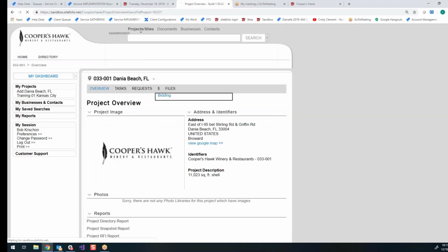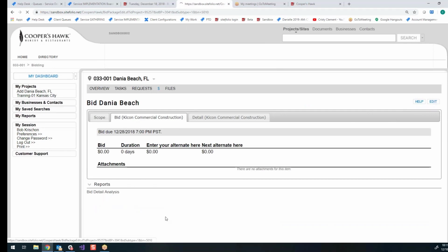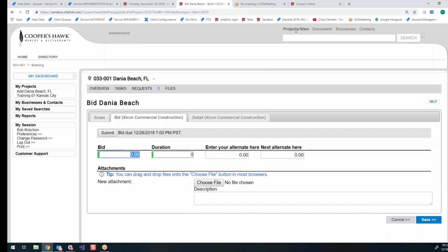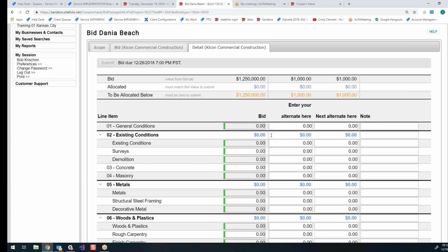So I'm Mr. Kycon, and I'm ready to submit my bid. So the first thing it's going to ask me to do is enter my lump sum bid. So I'll do that here. And then it's going to ask me how many days. And then my alternate. Okay, now that I've entered my lump sum, then I have to allocate that over here. So they have to break it out by line item for you.